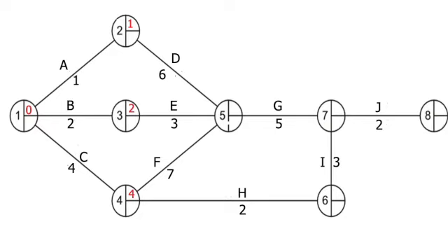Right, okay, now we get to node 5, and node 5 is a little bit more complicated, because it has lots of activities from different nodes going into it. So what we need to consider is what the earliest start time will be, and this will be the time it takes for all previous activities to have been completed.